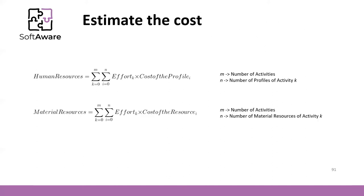To estimate the cost, we start from each work package. In each work package we have a human resources profile associated to perform that work package. Using that profile, we need to get an estimation of the cost of the profile. For example, if we have a junior programmer for a work package with an effort of 10 hours, we multiply the cost of the profile by the effort, then do this for all other tasks to get the total human resources cost of the project.